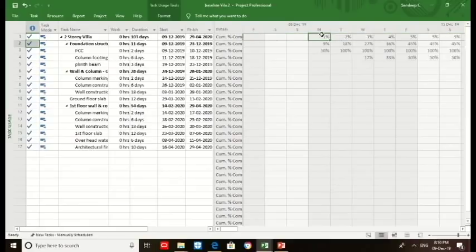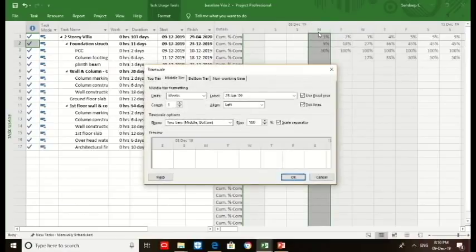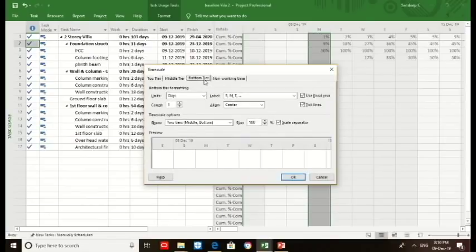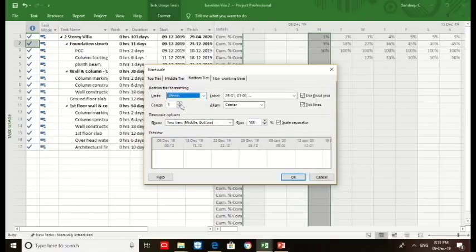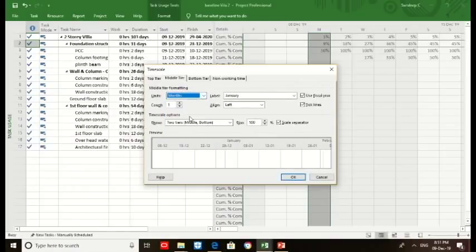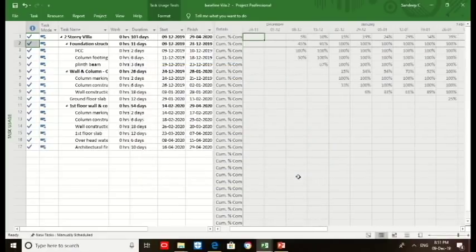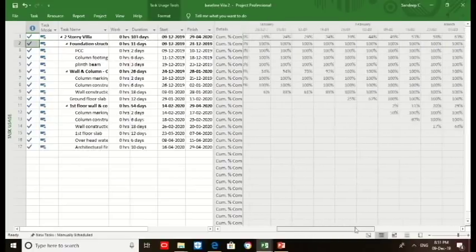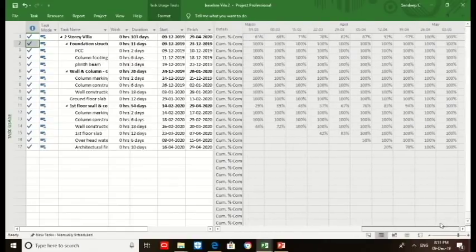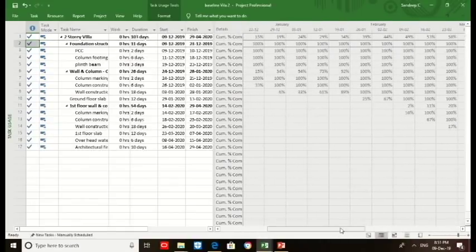Then go to the timeline, click timescale. Again choose as per your requirement. We shall make it as in weeks, count we maintain as one. The middle tier will make it as months. Then click OK. You could see that since second week of December there is an increase in the percentage, the cumulative percentage. We shall copy this cumulative percent.